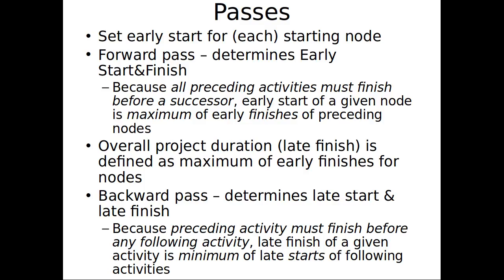So, first, we're going to perform a forward pass, which determines the early start and early finish. Okay? And the fundamental realization here is that if we consider a given task, a given node, the earliest it can start is the maximum of the times the things that precede it have finished.